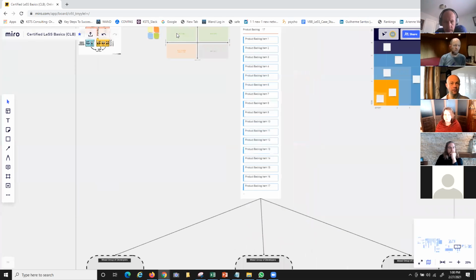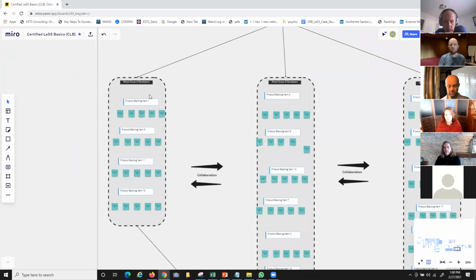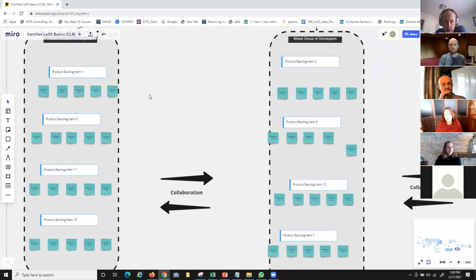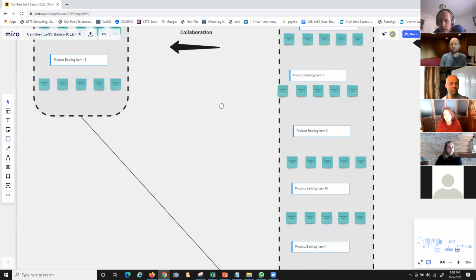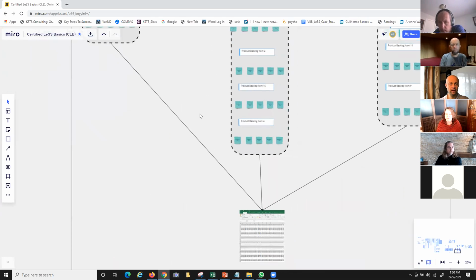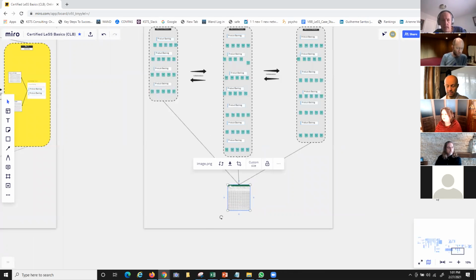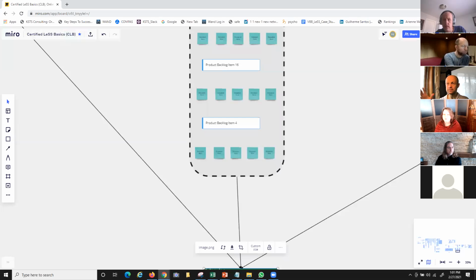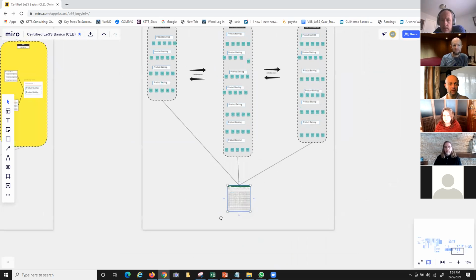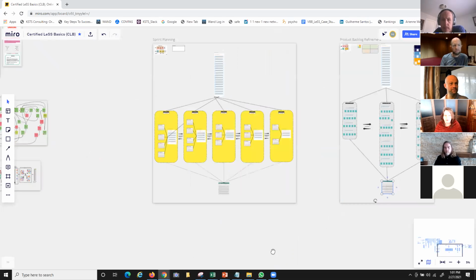And from there, you go to individual breakout sessions. These are mixed groups of individuals, with lots of collaboration across. These backlog items are being refined and refined and refined, and you may produce smaller items off of those. And guess what? Let me zoom out again. You start with the backlog, you finish with the backlog. It's just a better refined backlog. No one takes any items yet to themselves and says, this is mine. This will come later when they go to sprint planning. I misspoke again.